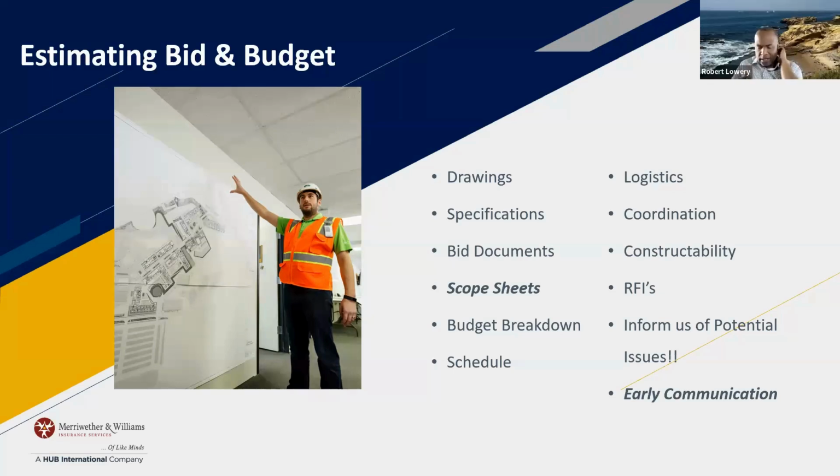Next slide, please. Yeah, so I just want to chime in real quick before we move on. Within these bid documents, if you're a trade partner or a GC, there should be a sample of the contract in here, so you know what's in the terms and conditions that you're bidding on. That is real critical with some of these documents. And if there is no sample contract, ask for one. Because within that contract, there might be language of pass-throughs. Some of their own requirements might have to be passed down to your first, second tier members as well. So understand if there are pass-throughs. That is the key thing there.